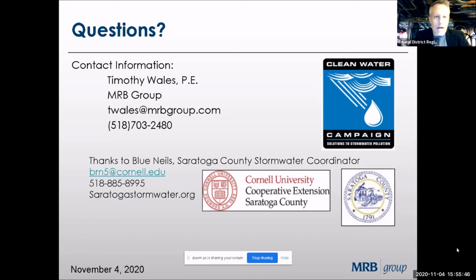Yeah, the DEC publishes a very handy chart, which I'll post after this session. I'll include it on our Eventbrite page to explain what permitted coverage is required for certain types of developments. The general rule of thumb for a community that doesn't have its own stormwater standards for site development is that a disturbance of an acre or more requires a stormwater management plan and permit coverage. That may be different in ag districts, although an acre-size building would be quite considerable. But I will post that so people have access to some of those resources, and that may answer their questions to that level of specificity.